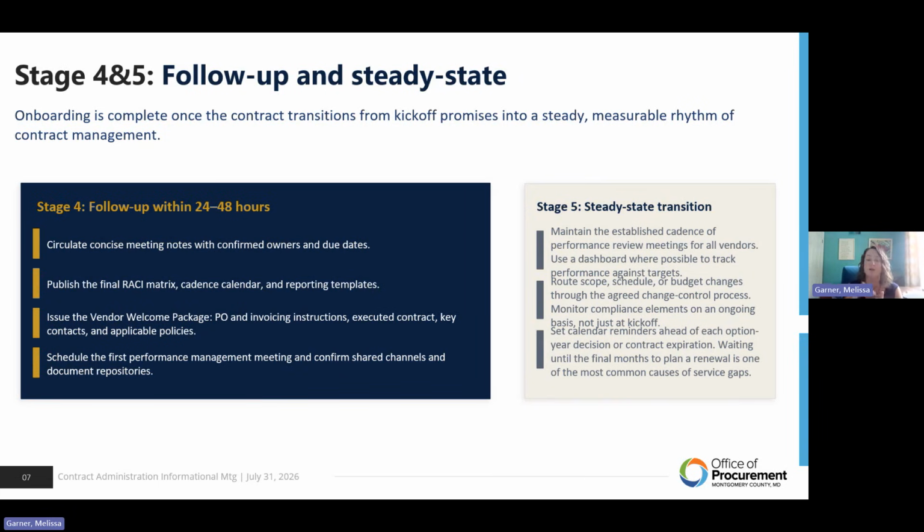Whether it's this meeting or any other meeting, follow up with meeting notes, meeting minutes, send them out to all the parties that were in attendance. That's your opportunity to put in writing, we had this conversation. These are all the things that we touched on because these are the important things that we need to all be on the same page about. Here's your copy. And if they don't come back and say, no, we don't agree with that, or that's not what was said, or whatever, then that stands. Those are the meeting minutes. Everybody's accepting them.